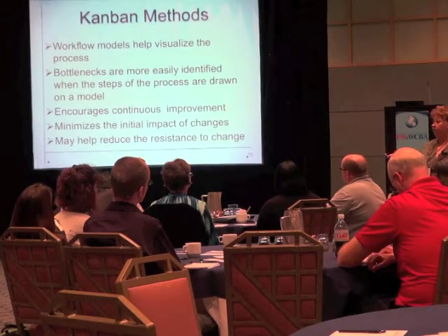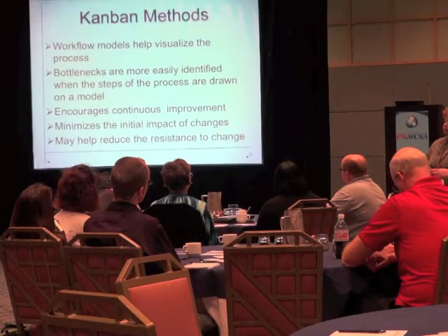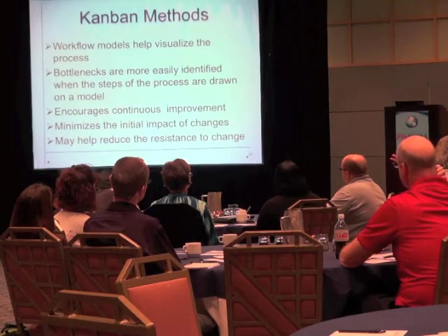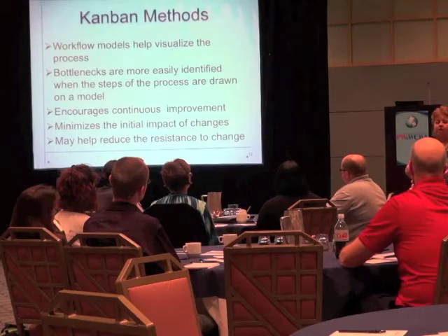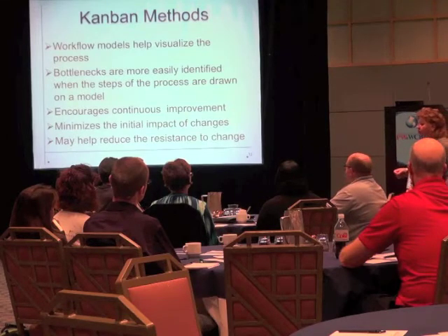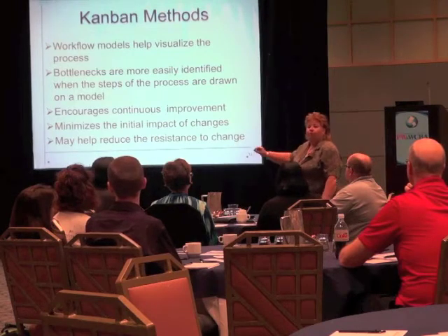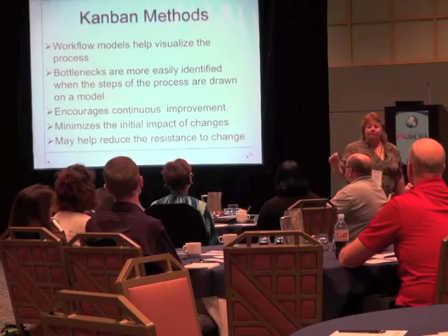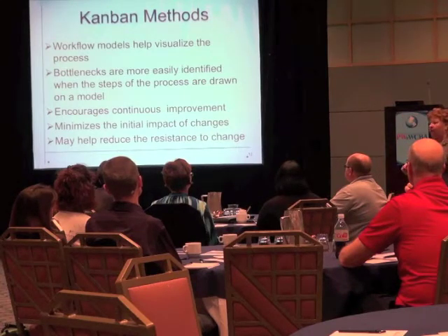All large systems have bottlenecks, okay? And when you first map out your flow, and if you do a value stream map, using another term, right, you will find out where things sit waiting for a long time, and you need to decide, why does it wait? Is it a good reason, and could we change it? What you'll find is that the minute you clear up a bottleneck, it moves. The bottleneck is a demon that lives in our systems, right? A hairy little beggar. Right?